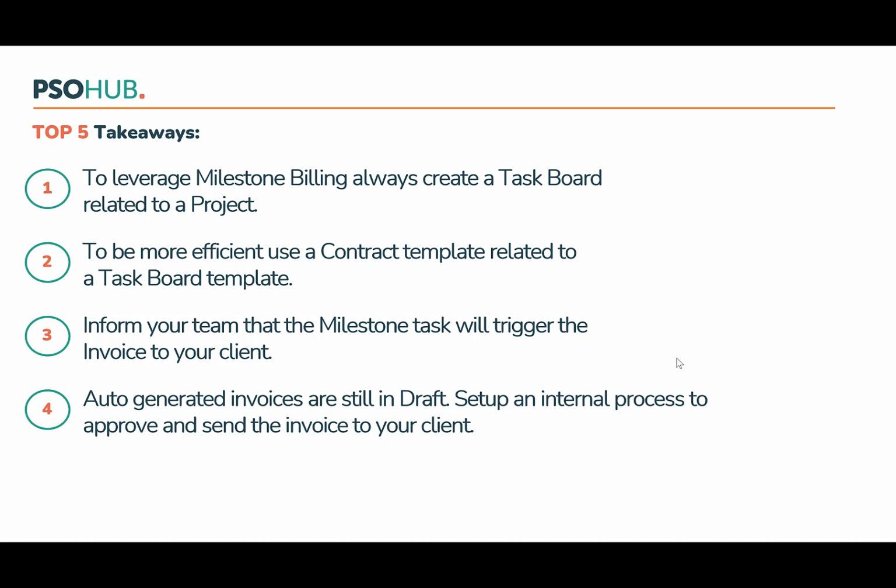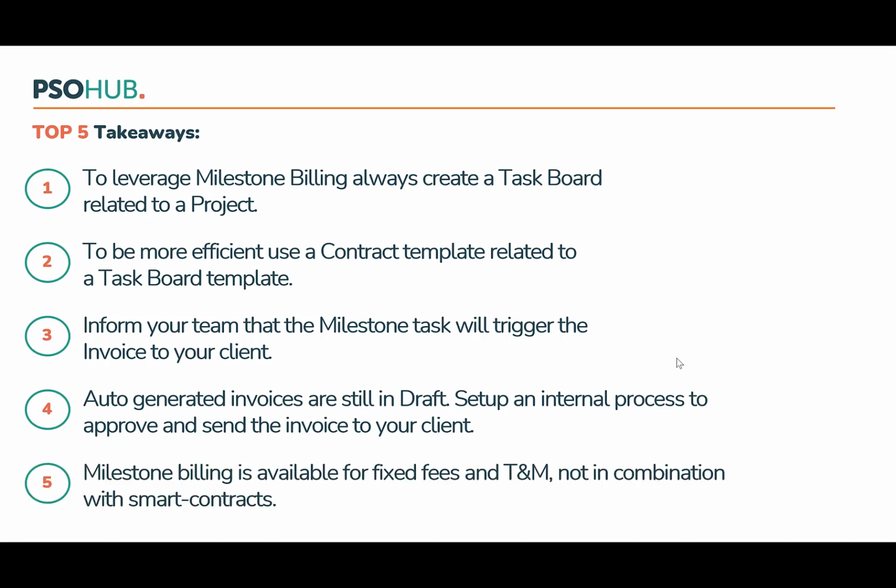And last but not least, number 5 as a takeaway is milestone billing is only available for fixed fees and time and material, and cannot be used in combination with smart contracts.